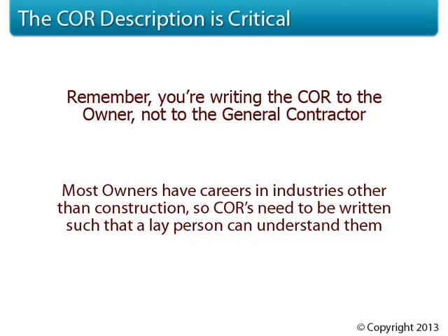Owners periodically receive a stack of change order requests from the construction manager to review. The owner then goes off and reviews these change order requests on their own. Then the owner comes back to the CM with two stacks. One stack is the change order requests that are approved and will continue gliding right through the process. The second stack are the change order requests that the owners have questions about, and those requests are not going to get signed until the questions are sufficiently answered. Obviously, we all want our requests to wind up in that first stack, not the second one.